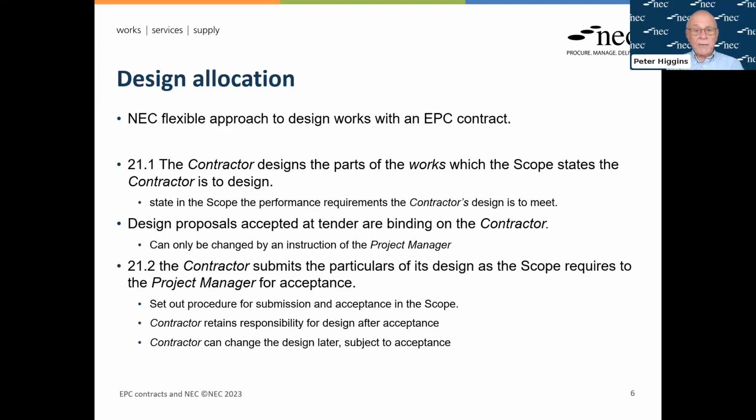It can only be changed by an instruction of the project manager, and the project manager is only going to instruct that change if it's something which actually improves the thing from the point of view of the client. So we have this process of getting design proposals of some level at time of tender, if that's what you want. And by binding them into the contract data, they can be fixed on the contractor. Other information you may get, and you may decide you want the information to give you some level of reassurance, but it's not really starting to fix on the design. So that can be left separately.